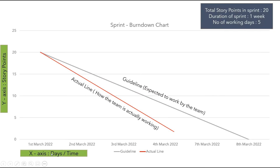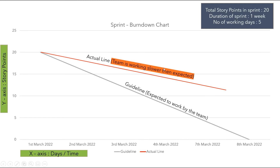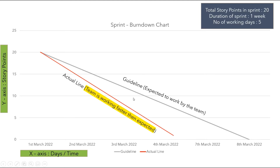The y-axis represents story points and the x-axis represents days or time. The sprint starts on 1st March 2022 and ends on 8th March 2022. 5th and 6th March are not shown as they are non-working days. The burndown chart has two lines: the guideline, shown in gray, which represents how the team is expected to work, and the action line, shown in red, which represents how the team is actually working. If the action line is above the guideline, the team is working slower than expected; if below, the team is working faster.